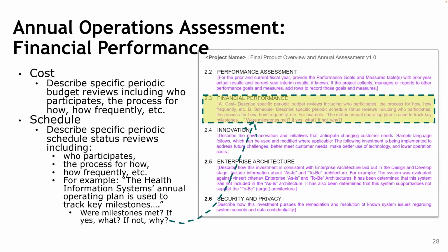Same goes for financial performance. There was a question around cost versus scheduling earlier. That's a fine balancing act that every technology company faces on a daily basis. It's not a linear equation. For example, to bring a 9-month project down to 3 months, it might not be just a 300% increase in staff. It might be a 500% increase in staff.